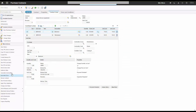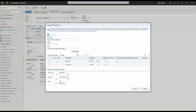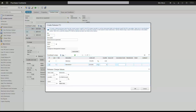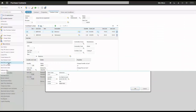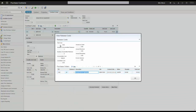Now with this approved contract, I can go to Actions and create a release PO — auto-numbered as PO 1100 — for this vendor. I'll select both contract lines and change the quantities to four hours each. I'll charge work order 1211, and clicking OK creates a purchase order. I can then review release costs: total cost to date is zero, one uncommitted release for $560 — uncommitted because the PO is in awaiting approval status — and I can track what I've received, the amount remaining, and what's been invoiced.